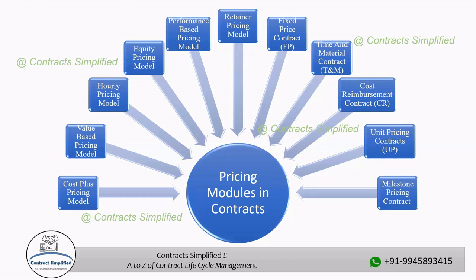Before a milestone is considered complete and payment is due, the client usually has the opportunity to review the deliverable associated with that milestone. If the deliverable meets the agreed upon criteria, it is accepted and the corresponding payment is triggered. The contract should outline the payment terms, including the due dates for each milestone payment. These terms could be based on specific calendar dates, the completion of the previous milestone, or any other agreed triggers.